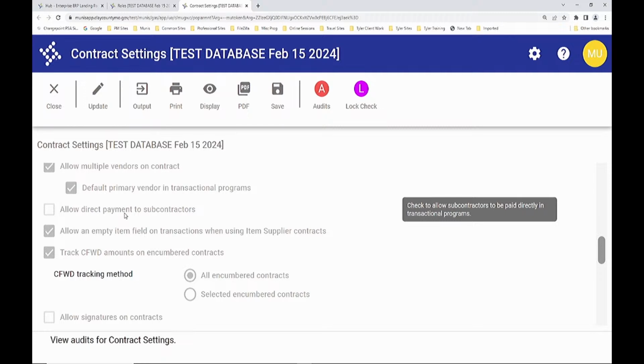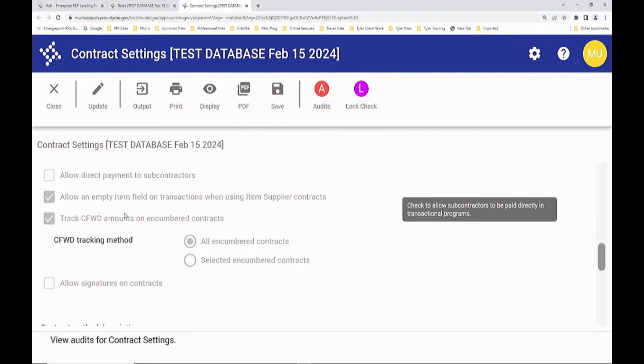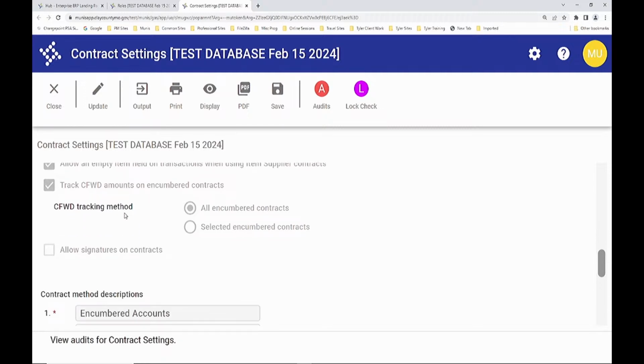We don't normally have to do that, but Missouri law is if your contractor does not pay the subs, you are liable to the subs. So if you pay your contractor $100,000, and they haven't paid their subs, you are liable. I don't know if we do, but that's going to have to change our terms and conditions, because our terms and conditions state otherwise, that the contractor's responsible for their subs. You might run that by Kevin Graham.